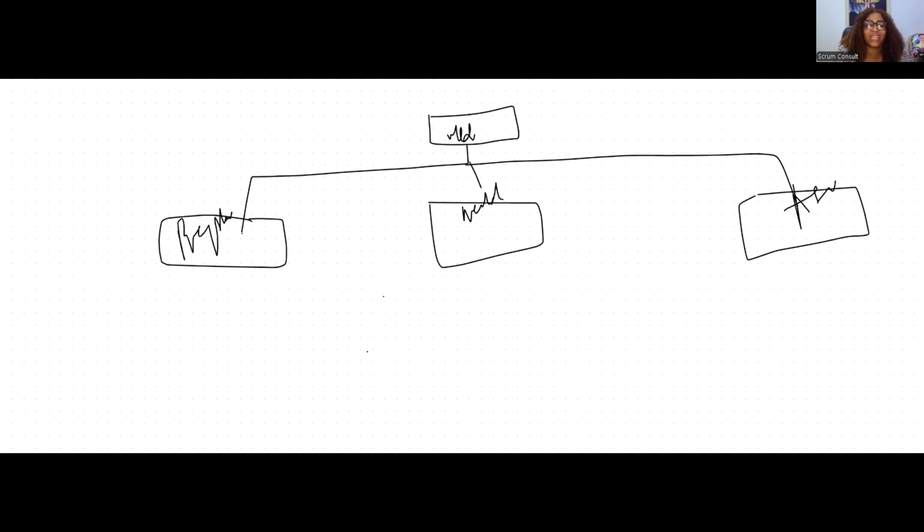Don't forget, if it's a projectized environment, you would have had more than 1 project. So at this point, it will be 1.1, 1.2, and 1.3. Have you seen how we are numbering it? Okay. So pre-planning, what do you want to do here?